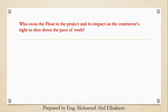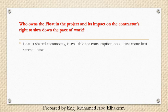Who owns the float in the project and what is its impact on the contractor's right to slow down the pace of work? Float, a shared commodity, is available for consumption on a first-come, first-served basis.